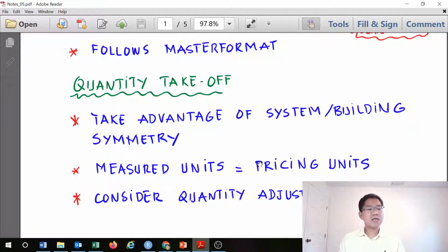And I experienced that in one senior design a few years ago. They did the south access road for our FGCU campus. You see that from the University Village to South Village, we have an access road. One group of senior design students designed the project and estimated the cost, and it came out a very low number. They came to me to ask why it's low. They were concerned, but they could not find out why. So that is the problem here: the unit that they measured and the pricing unit are not the same.